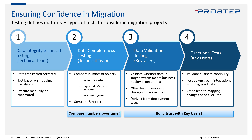This may lead to a lot of mapping changes when key users see the data for the very first time. The good thing is you've usually already prepared deployment tests, so key users can leverage those tests or derive new tests from them. The last type is functional testing, also performed by key users, to ensure business continuity — meaning after migration you can continue working with the data without business disruption. You want to revise the data, send it through downstream integrations, and test whether all your new methods and the new system work out.